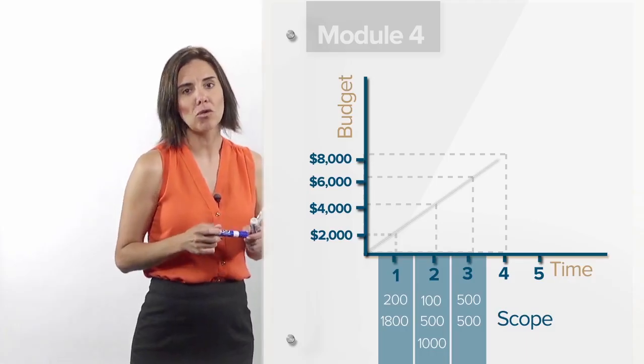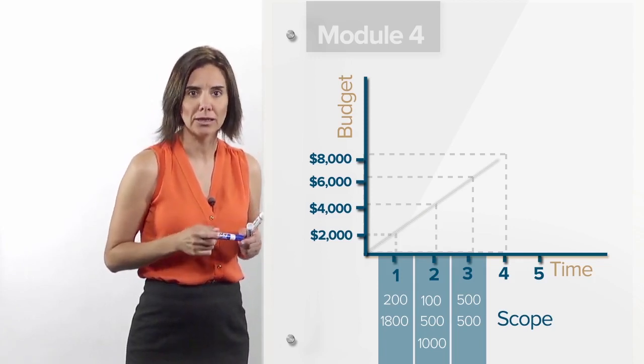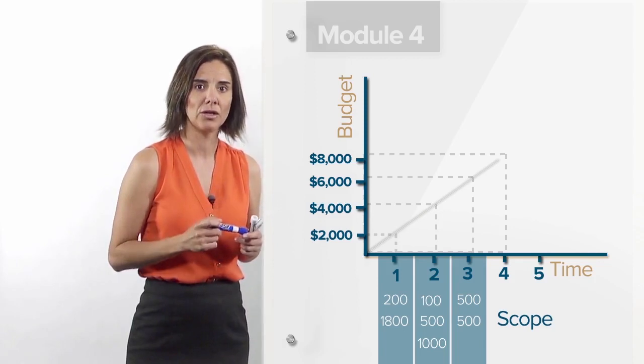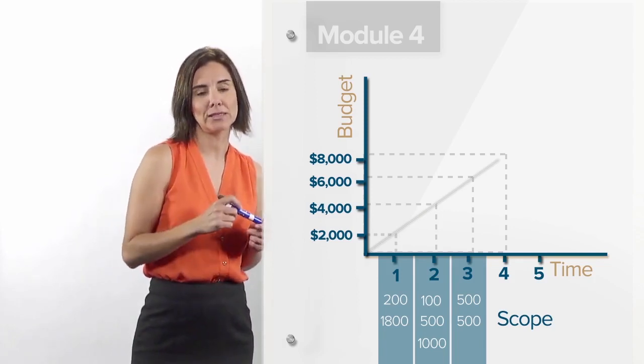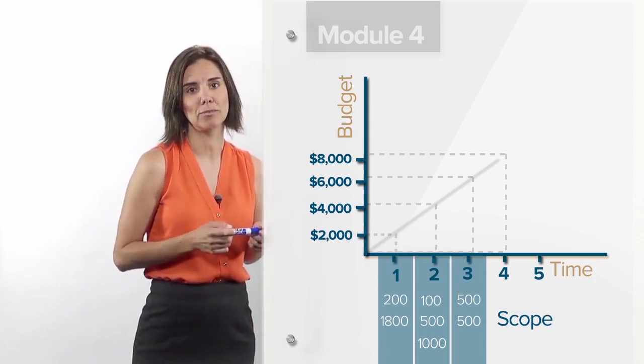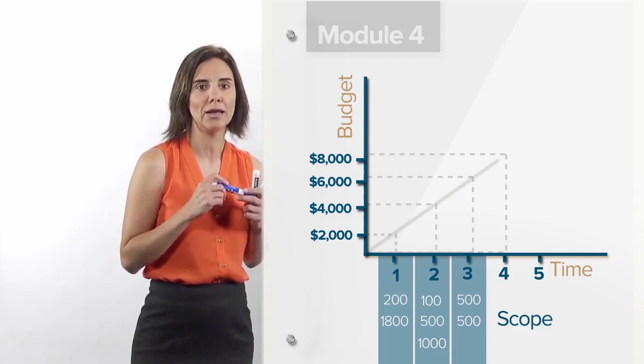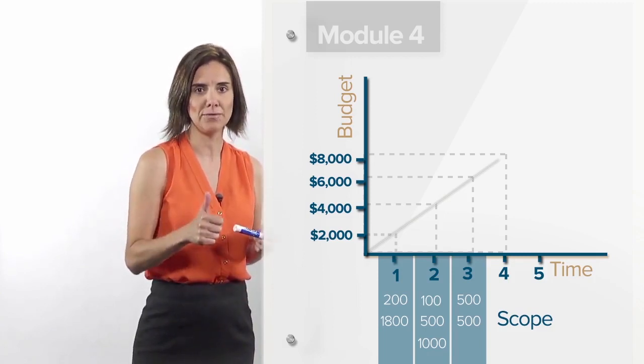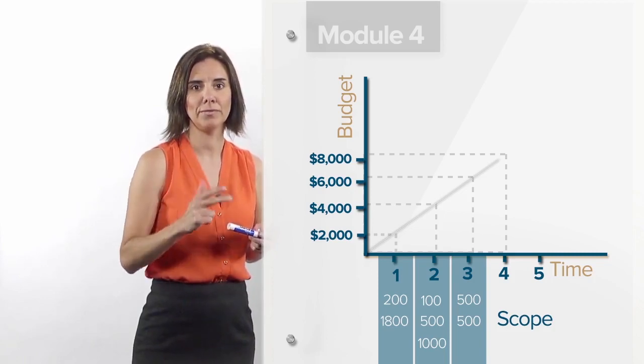As you can see, the S-curve is not the same as a budget curve. The budget curve does not reflect the physical progress. The nice thing about the S-curve, why it is tremendously useful in project management, is precisely because it combines the 3 essential factors that make up the project restriction: cost, time, and scope.